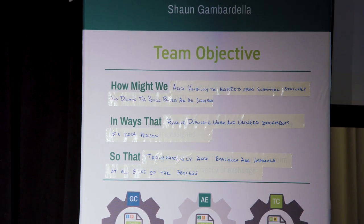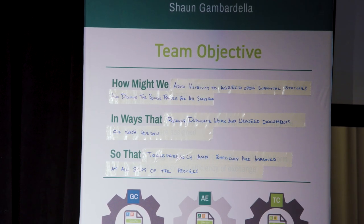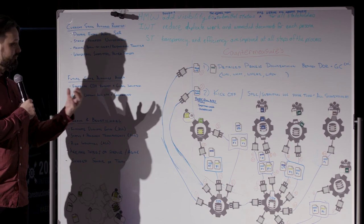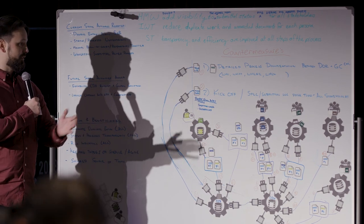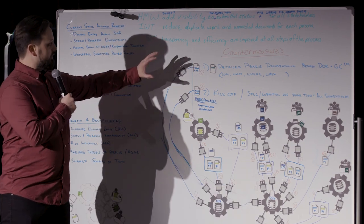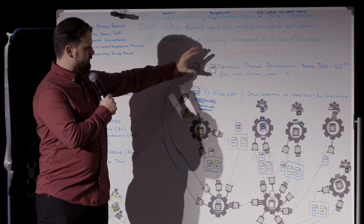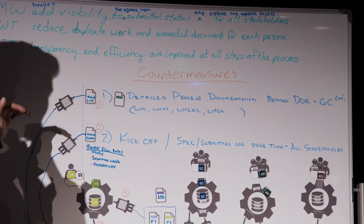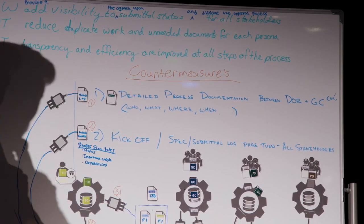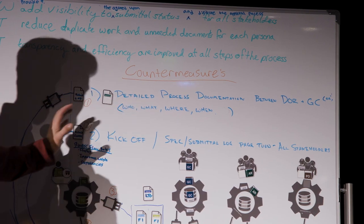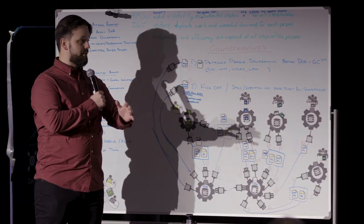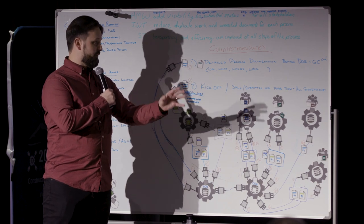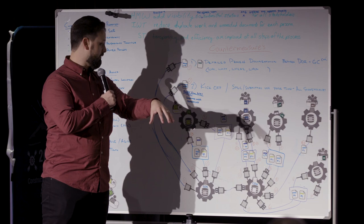We identified two problems to solve. One is people, communication, and interaction — technology is not an easy button; you still need human interaction combined with technology to make the process better. What we agreed upon is that the owner and GC need to align first on what they're building, creating a submittal log. The second pre-project kickoff meeting is a sync between the GC and subs to establish the agreed-upon process and expectations so everyone can build efficiently.